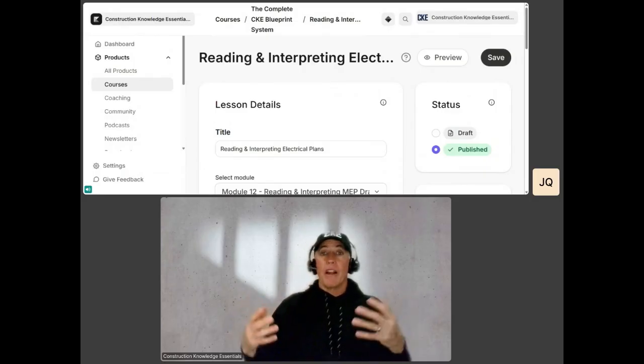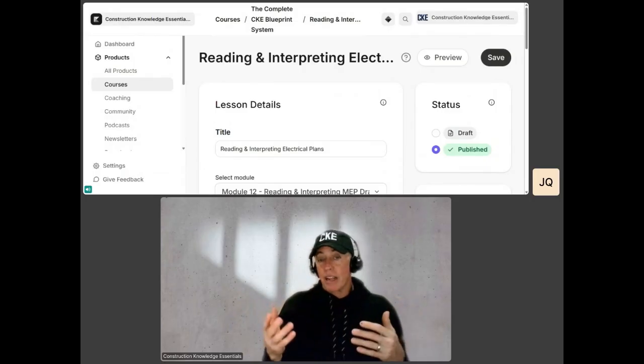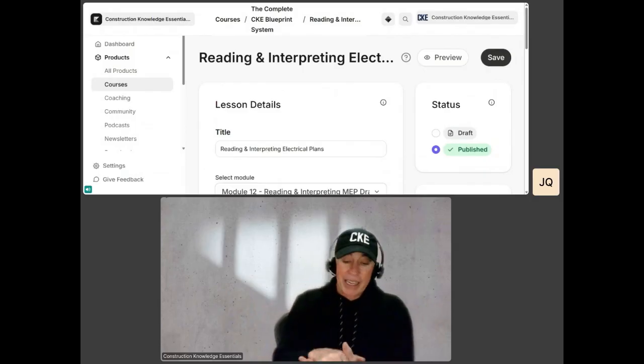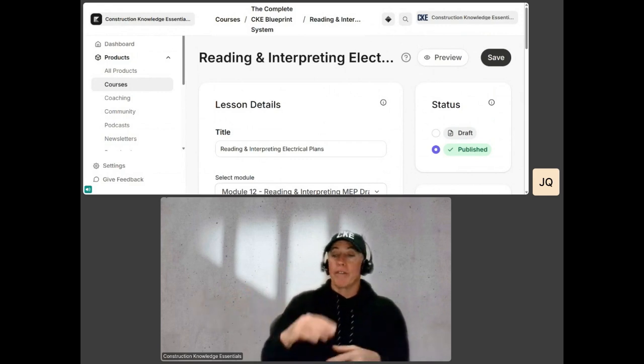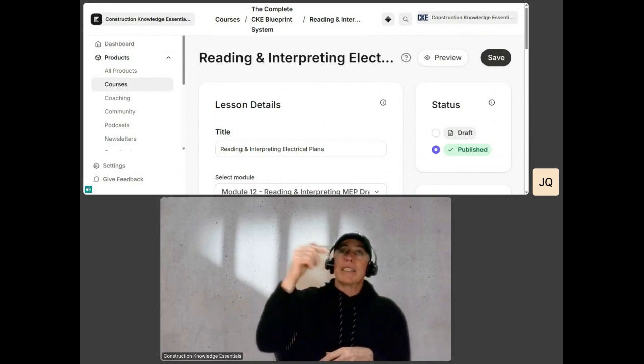And then we do tile, and I'll ask the tile guy, and the tile guy will say sometimes 6, 7, 8 days. You're like, why? Because I have to do the level of the shower, I have to build it up there. There's so many steps to it.